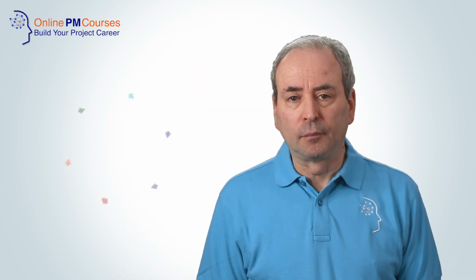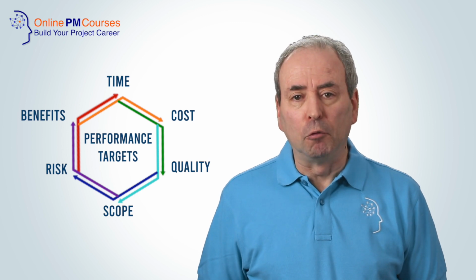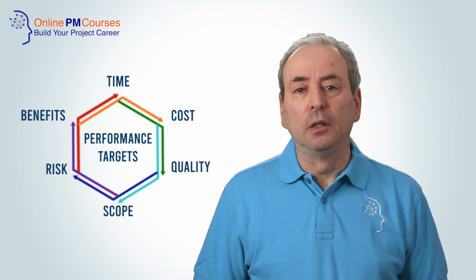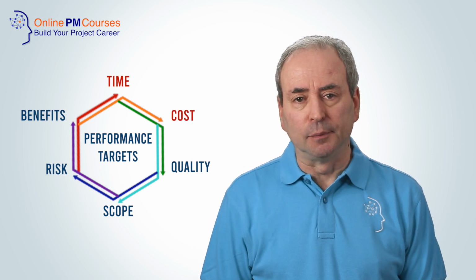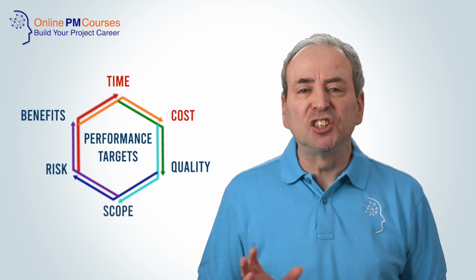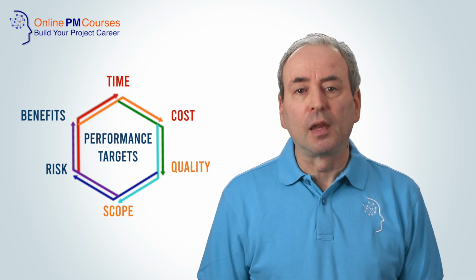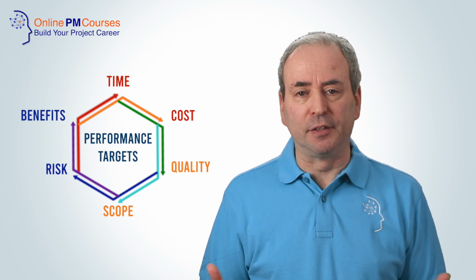The last important thing to say is that PRINCE2 has six important performance targets: time, cost, quality, scope, risks, and benefits. In PRINCE2 Agile, time and cost are fixed. They cannot change. So to deliver what users need, we flex scope and quality according to user requirements. The customer or client will also determine the balance of risk and benefit.